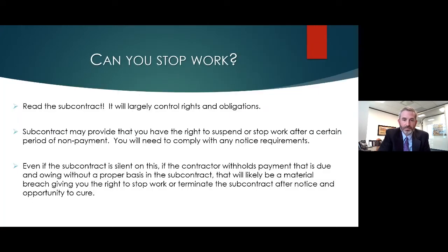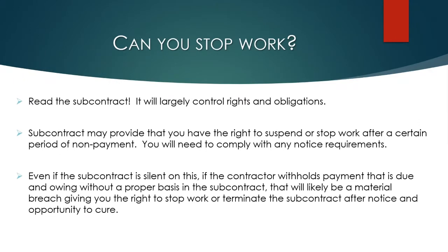So going to the next slide, once you've looked at that issue, whether there are any subcontract provisions authorizing the withholding of payment, if there is no proper basis for the contractor to withhold payment, you may have the right to suspend or stop work after a certain period. That may be expressly in your subcontract, in which case you need to make sure that if there are any notice requirements to give that type of pre-notice before you suspend or stop work, you comply with those.